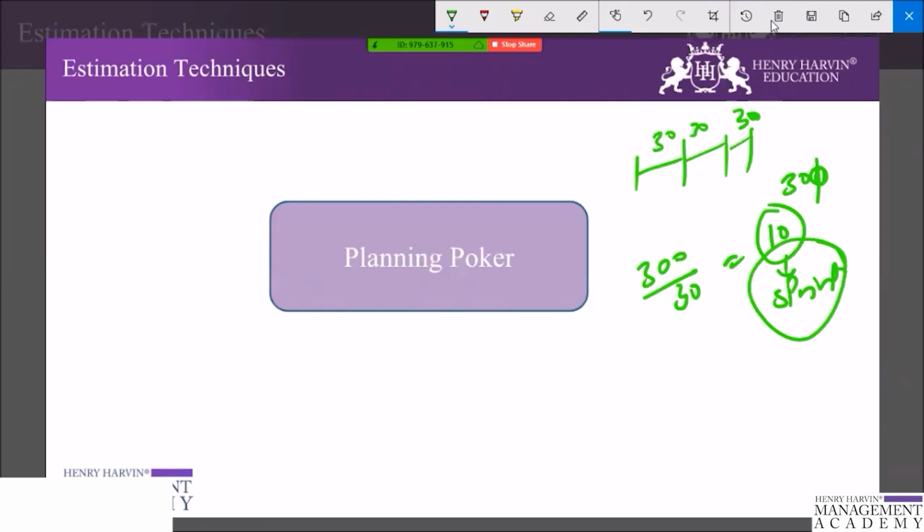This is however counterproductive, as the team spends more hours estimating a few stories to arrive at a magic number of days before being pressurized to deliver on that magic number. When a team is relatively sizing stories in points, a trend slowly starts emerging where similarly sized stories show similar time to implement. So if there is a bad estimate, it bubbles up automatically as an exception.